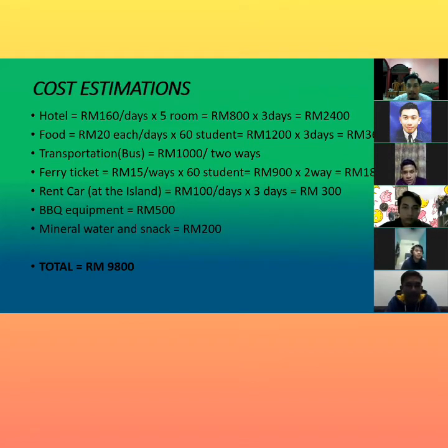Okay, for the cost estimations, firstly, hotel that costs RM160 per day that consists of 5 rooms, and the total 800 multiplied by 3 days equals 2,400 for the hotel. Next is for food. Food totals RM20-ish per day multiplied by 60 students equals RM1,200, and multiplied by 3 days equals 3,600.